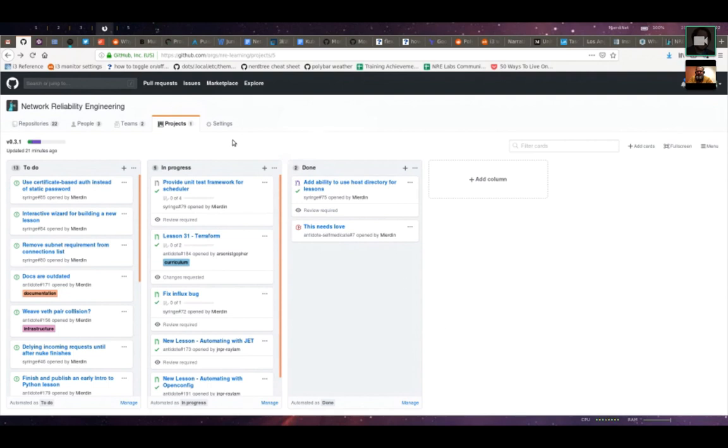Anyway, as I was saying, what we normally do is when we're working on a release, we usually have two projects up, especially the closer we get to a release. As we're working down this project plan, if we feel like punting a certain issue to the next release, we'll have a second project spun up. In this case, it'll be 0.3.2. That way, it's a way of us punting an issue. But the current release is 0.3.0, and so that means the release planning we're going through right now is 0.3.1.